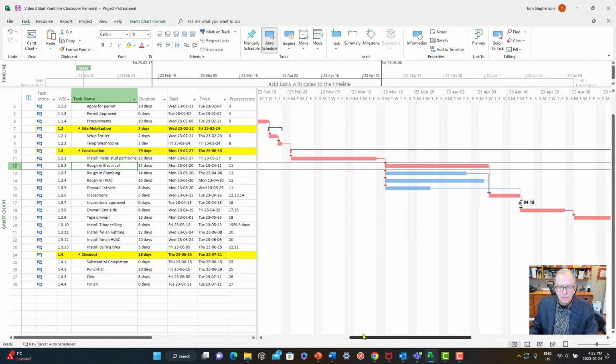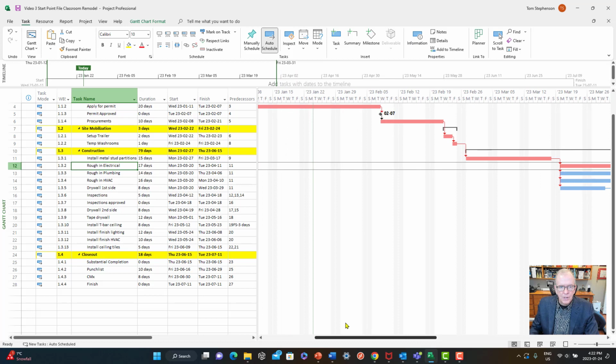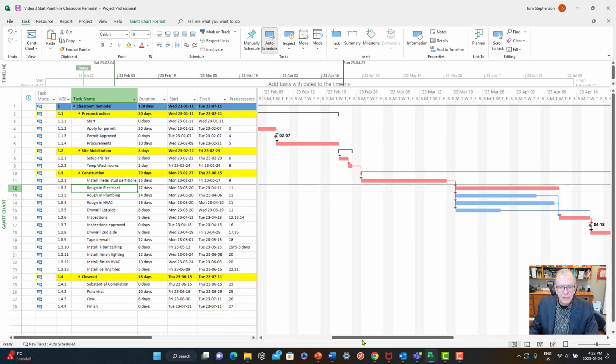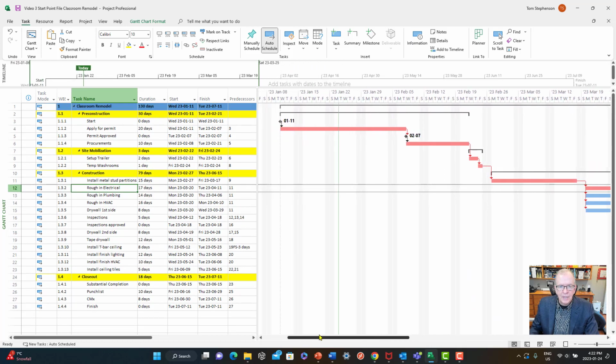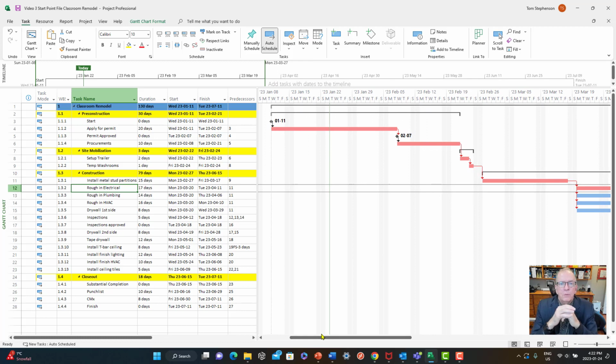So in this particular project schedule, I have not put in any holidays. So we haven't done anything to the calendar yet. Realistically, you would probably do the calendar first. You would set up all the holidays that you have, and what I would do is I would set up a template file. In my playlist, I've even done a video where I create a 10-year template file for calendars, and that's where you've got all of the holidays in it for the next 10 years, so every time you start a new project you don't have to put in the holidays.